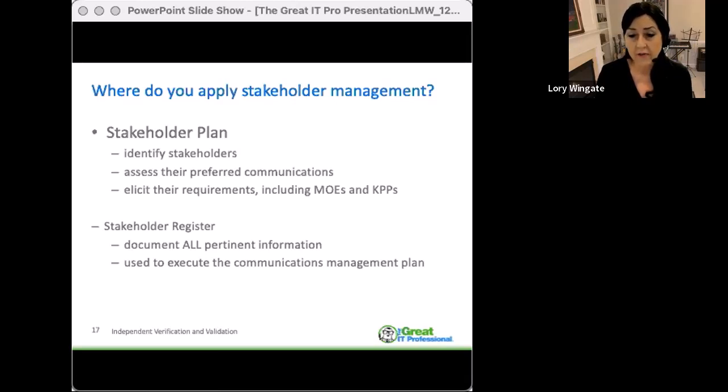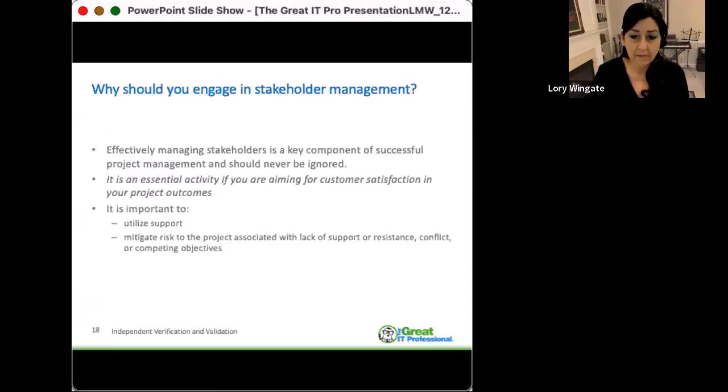And there are so many different ways that stakeholders, including your customer, may want to engage with the project that it would be impossible for me to list everything here. But fundamentally, at the beginning of the project, you'll want to set up a spreadsheet that helps you clarify what your customer's intent is, what their interest in engaging the project is, their level of influence, the level of perceived support, and their preferred communications method. We'll build on the spreadsheet thought as we talk further on, and you'll want to build that spreadsheet as you start developing your scope.